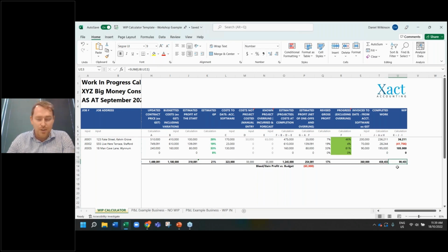So what that means is, if you're feeling cash being a little bit tight and you're a little bit nervous, and you do the back of the envelope calculations for WIP and cash and timing of those invoices coming in, there's more cash coming in the future because you have incurred, as far as the effort goes, and particularly around the costs, about 100K worth of income that you haven't got in the business yet. So keep in mind, WIP is in cash flow. It is mainly around profitability and making sure the business is sitting in the black, because if you're not micro-measuring your margin, I promise cash as a byproduct will always hurt. So that's probably the big piece around WIP.